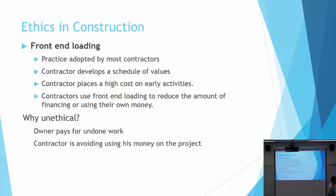So we said that you do an estimate for a project. You have phases. Didn't we say that at the beginning? You have like phase 1, phase 2, phase 3, and you, as an estimator, should estimate each phase on its own, and once it's done, you have to bill the owner, who will pay you back. And he will take the retainage out of it. Isn't that right?